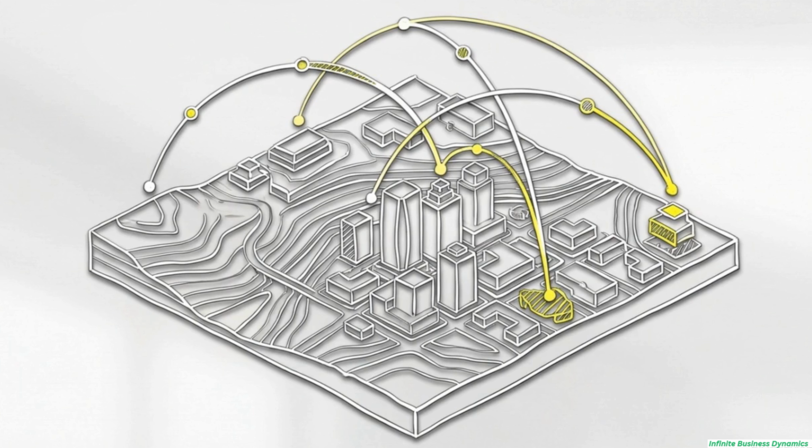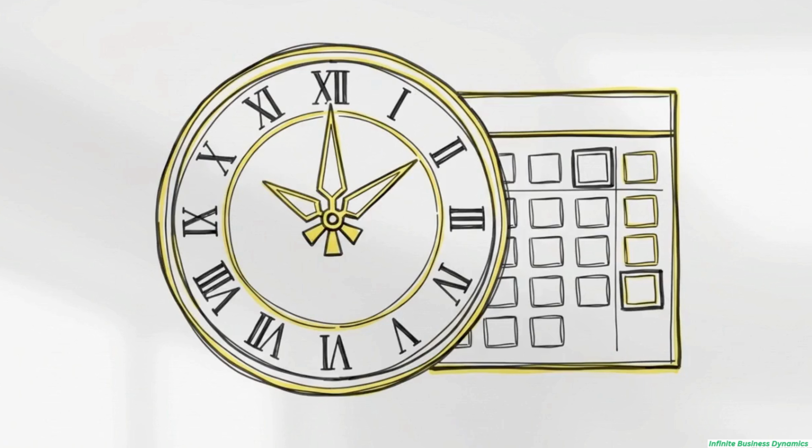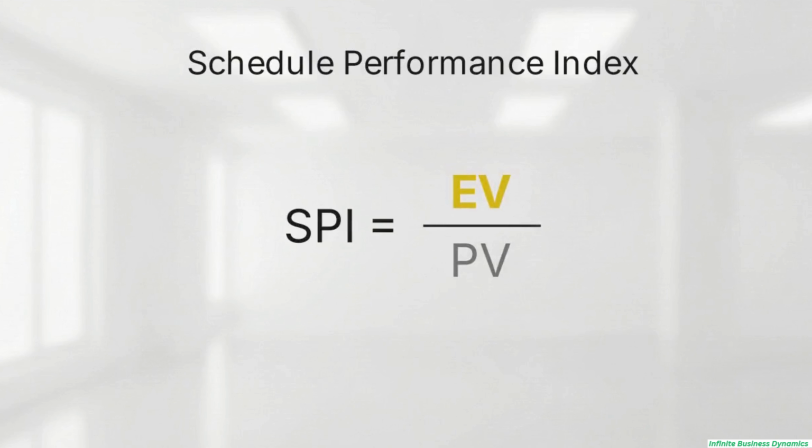Mastering these two specific ratios provides the mathematical foundation required for accurate predictive forecasting and multidimensional project analysis. We begin with the Schedule Performance Index, the definitive measure of a project's schedule efficiency. This graphic breaks down the specific formula for calculating SPI, earned value divided by planned value.